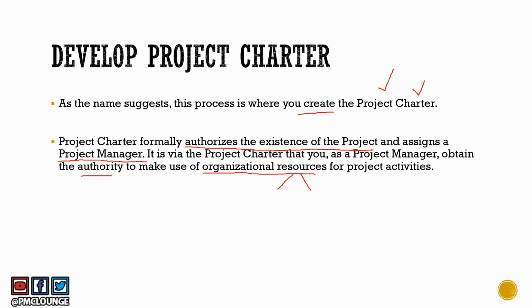Now, let's say you are working in a matrix environment. People don't really report to you. They have their own functional managers and they report to their functional managers. If you go to a functional manager and you ask for 2 developers for your project, and you go to a test manager and ask for 2 testers for your project, they might as well say, well, who are you and what project is this all about? That's where you need to show them the project charter.